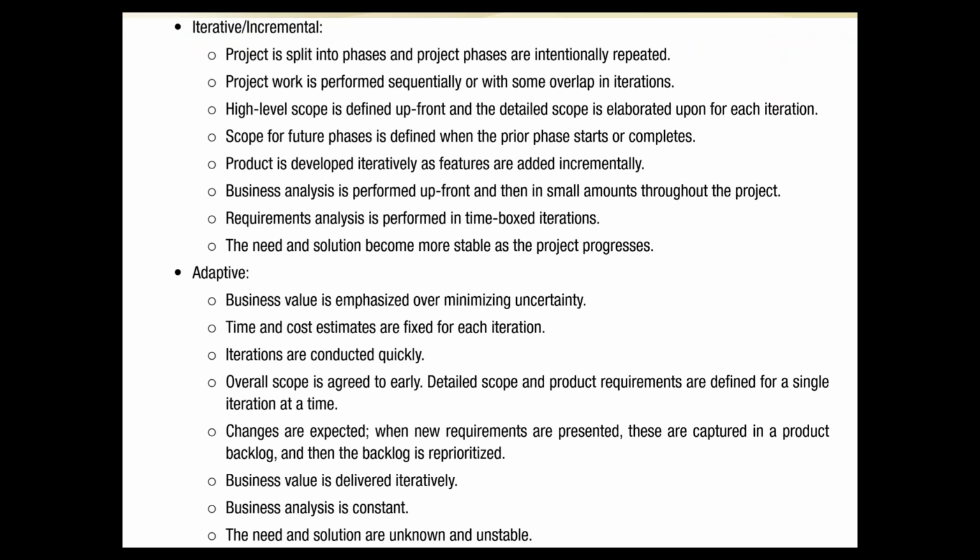As far as the iterative approach is concerned, these are small capsules, one after the other. If our customer wants to bring any change, maybe in the middle of the project, then that middle is somewhere after 2 phases. So at least those 2 phases will be safe, and any effect the change brings will be on all the phases after the second. When this change comes, we are actually doing the third phase, but the third phase will not be impacted because it is ongoing. We can't touch something which is ongoing. When the third phase completes, then we entertain the change and see what will be affected in the fourth and fifth phase, not the third.